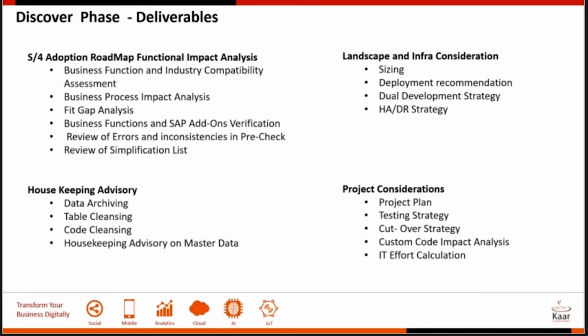And then some housekeeping advisory. How are you going to clean up your code? How are you going to clean up the tables like logs, like IDOC logs that you don't need anymore? So it's spool logs, the batch logs, because even though all of this has jobs that do the cleanup, you really want to relook at all this, because when you enter into a conversion, the size of the database really matters. One, for the size of the hardware that you're going to procure, two, how you go about to simplify your conversion process, and number three, how are you going to manage this going forward?